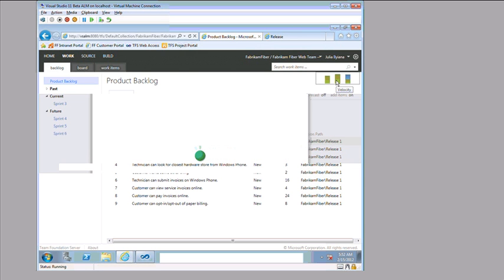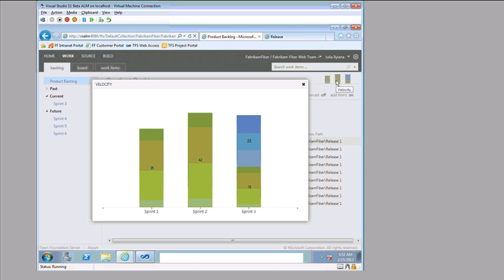And we're tracking a key metric that comes to us from Scrum, but anybody Agile can do it, which is the combined story point value of the stuff we delivered in each of those sprints. When we click on that, we get a larger chart that opens up and tells us in a little bit greater detail the value that was delivered. So we've got 35 points in Sprint 1, 42 points in Sprint 2.